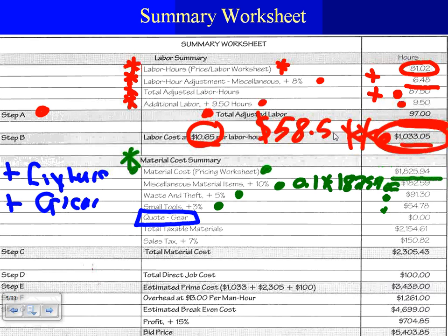And what does that do to your labor estimate? Very good point. Gear, the gear is all the equipment. We add them as a material, and then we assign a labor only for them. So when we take, in a major project, a fixture like this, you take the fixture as labor only. So there's a possibility of turning it, but 0 for price.